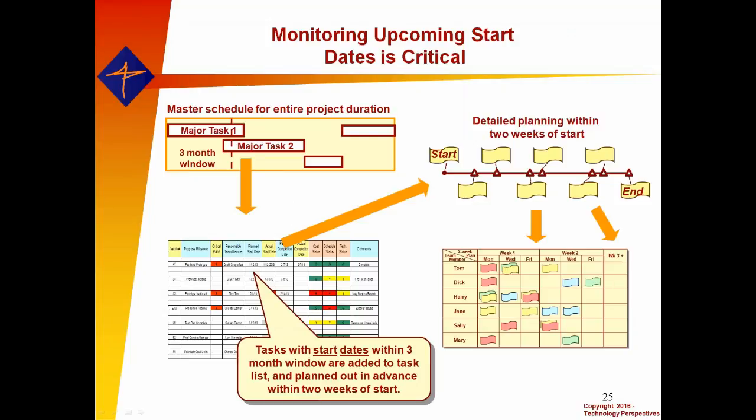So this is literally just taking, again, a magnifier to the master schedule and allowing us to informally and dynamically plan the details. This is often called sprint planning, meaning that we're allowing for the fact that we have a big milestone up there, but the way we get there could be very different depending on the conditions at that time when we approach the milestone, so we can dynamically adjust to have our best shot at being able to hit the milestone that's coming up, or milestones.